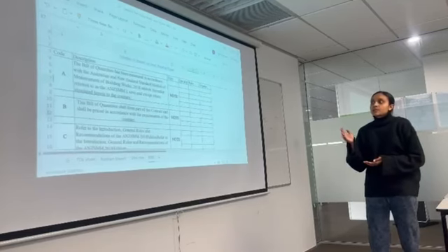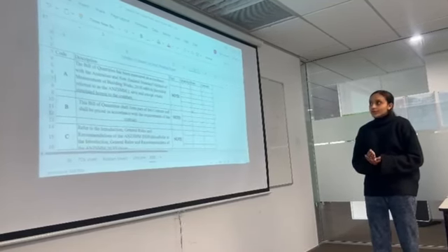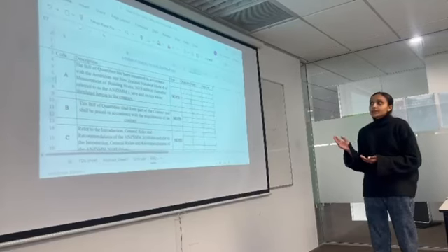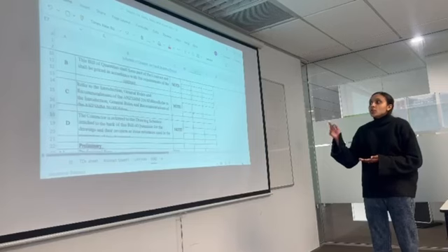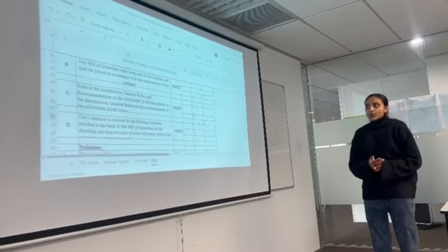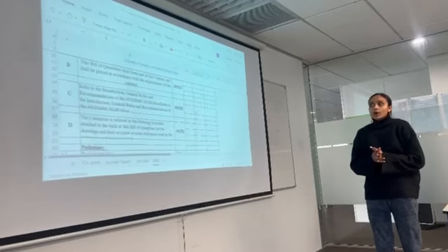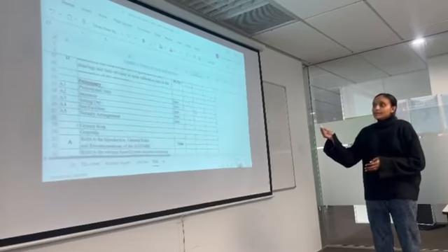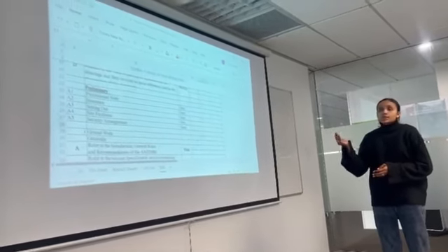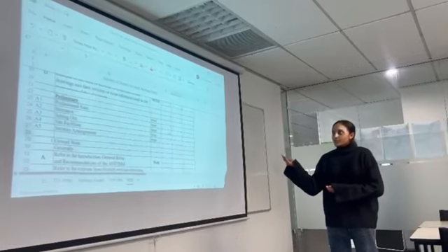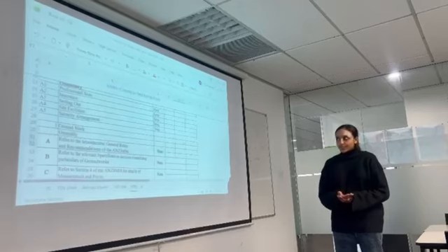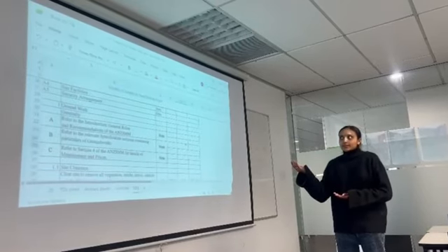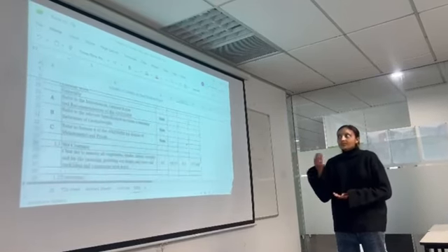The first one is that the bill of quantities has been measured in accordance with the Australian and New Zealand Standard Method of Measurement. Next, the contractor is referred to the drawing schedule attached to the back of the bill of quantities for the drawings. Here is the preliminary, in which the professional sum, insurance, setting out, site facilities and security arrangements. And again that is my first groundwork.